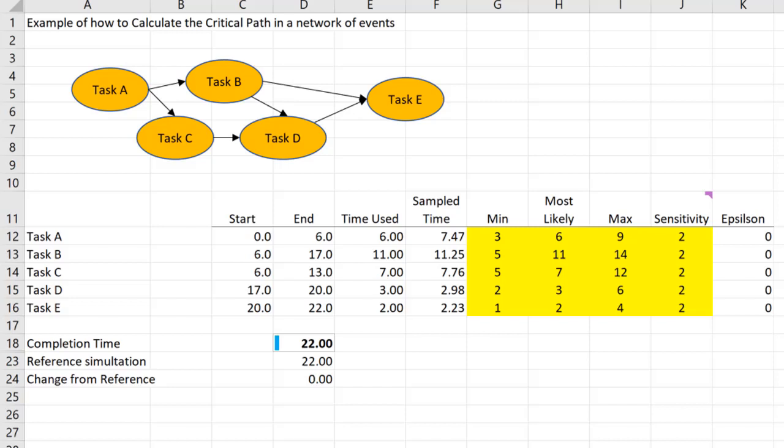Task B follows task A, as does task C follow task A. Task D requires task B and C to both be completed, and task E requires B and D to be completed.